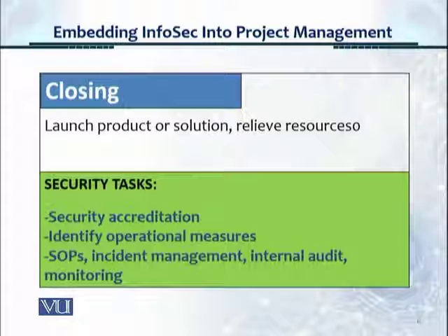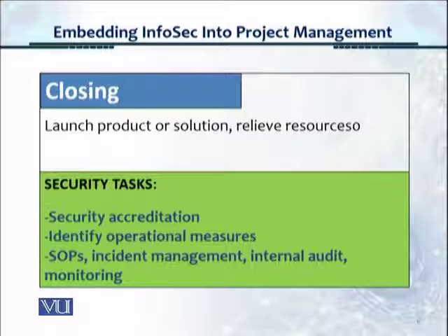And then finally, when you have achieved the objectives, we have the closing. Here we launch the product or solution and relieve the resources as well. The security tasks here are security accreditation, where we're actually certifying that the security requirements have been met, and then identifying operational measures. We develop the SOPs, the incident management, the internal audit mechanisms, and the ongoing operational monitoring.